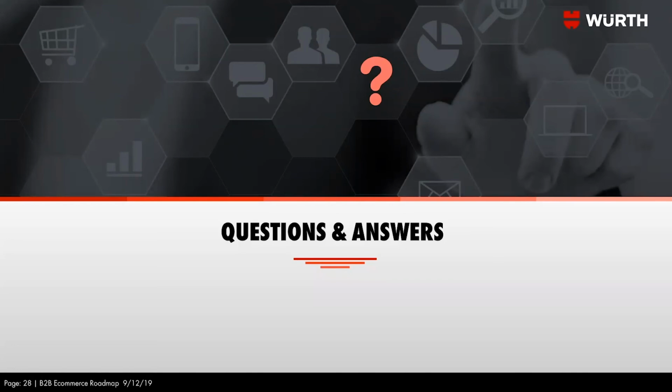Scope creep is probably going to be your biggest enemy in development. It's also something that's going to help you keep your project on track, because when you start getting these distractions, and believe me, you could be your own worst enemy, you could be the scope creeper of your own project. Make sure that you write out all the functionalities. When you start diving into your requirements, you may decide to scope out a project one way. When the developers get it, they're going to add their understanding of how it is actually going to be built. So you're going to change your requirements.